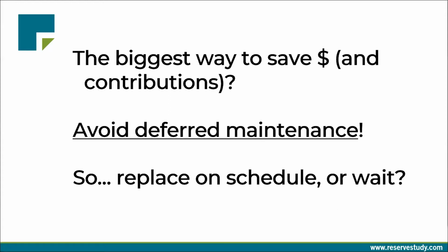Again, these are inevitable projects, and there is a sweet spot of value. When the remaining useful life is nearing zero, it's time to prepare or engage a professional to help you prepare a scope of work, bid documents, and help analyze those and make a decision for that best value. And the answer is often not the lowest bidder. Approaching reserve spending this way effectively avoids much more expensive deferred maintenance related costs, but not all reserve projects are the same.